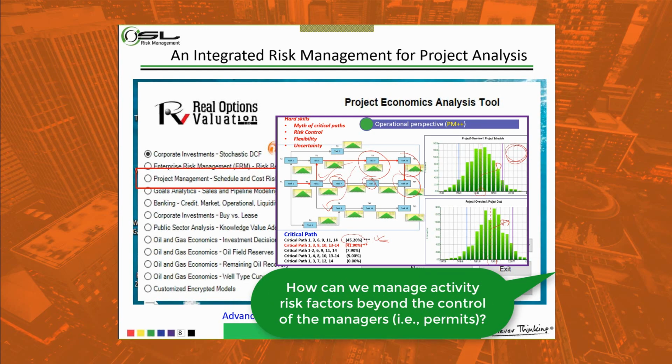When you work in the project planner, whatever happens with the permit increases the risk of that activity. On top of the estimation, it can be 10 days, it can be 20 days. This is why it's really important that you work in activity days. Activity days means that you are able to visualize what activity that permit impacts. Because, for example, if the permit is not affecting the design and it's not affecting the data sheet that you are providing to the vendor or to the procurement department, that activity is not going to be impacted. But you need to know, and this is why the critical path can change. Because if you can see procurement is working, design is working, because they don't depend on that one, but you have one activity, which is construction, for example, that depends on the permit, that activity should centralize that risk.